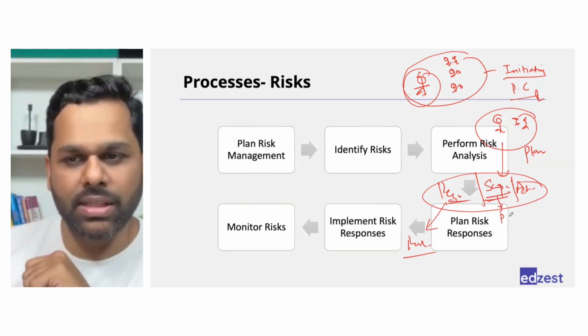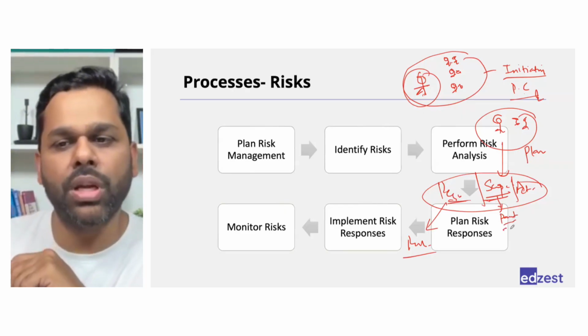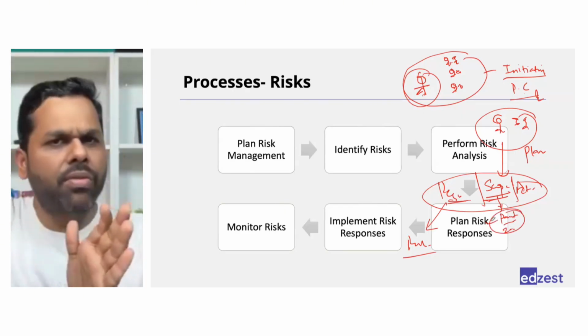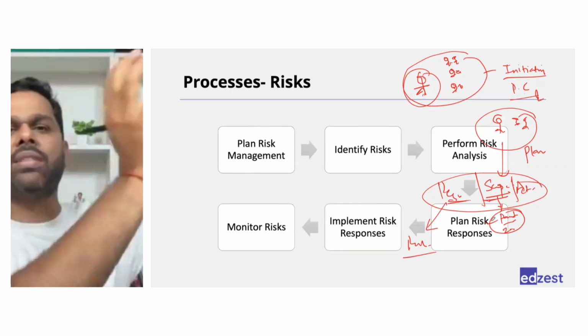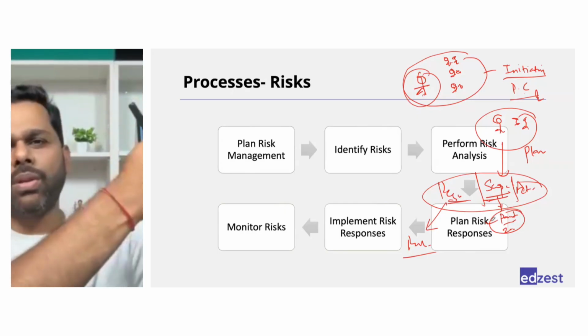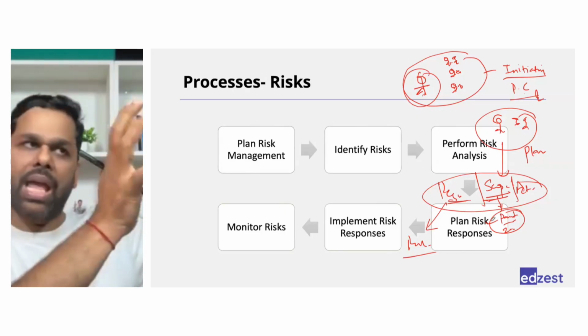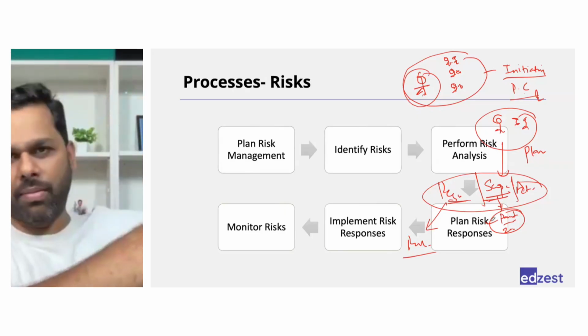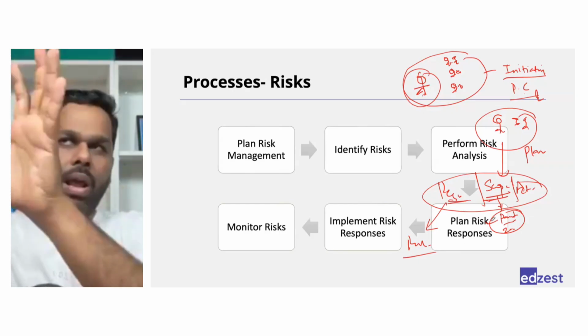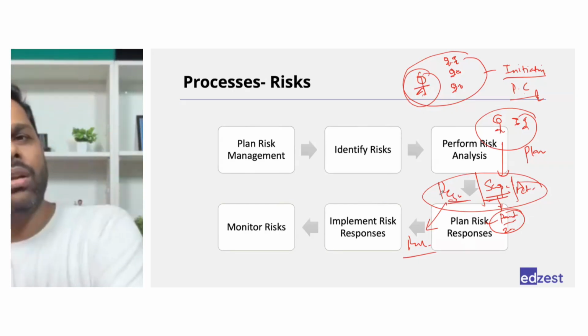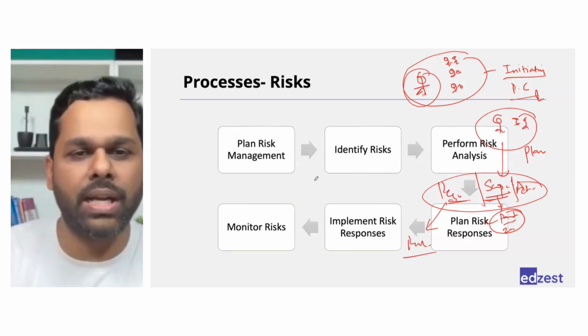So you will identify the risk that paint might burn off within 2 years or 3 years. So paint quality needs to be improved, right? This is how we work in project. As soon as we identify something, we start thinking what would be the activity, what would be the risk associated with it, what could be the budget of it, and then you deal with that one particular deliverable. Then you think about another deliverable, and you carry out all those activities that we discuss. Right? And together, the whole set of plan will be created.